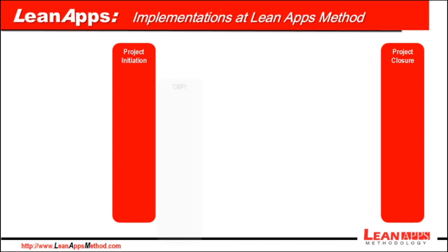First phase is CRP1, First Conference Room Pilot, which is meant to define the detailed solution that will go live. The consultants must present a pre-configured vanilla instance, also known as visual instance, along with the macro business flows and a high-level apps architecture, showing how the different modules interact among themselves. Similar to what I have presented in the video about the rollouts.